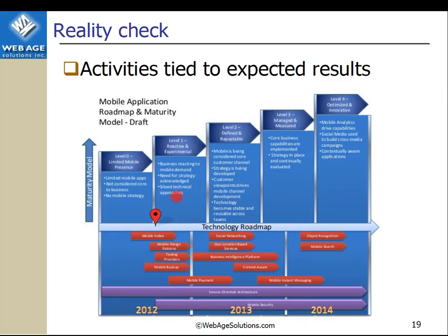Now if I notice that I have any gaps, so if I go back here and I'm at a transition, I'm going, I really should be pretty much through level 1, and I go back, well wait a minute, we're missing or we're weak on this area. I may be adding in another activity to resolve that. So this is the measuring, monitoring piece. Even before the architecture is complete, I have some of it there, and I want to evaluate it.